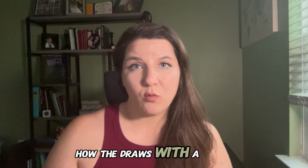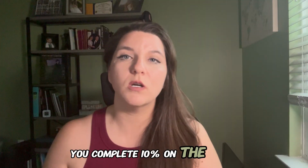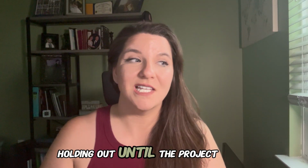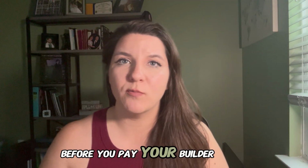How the draws with a one-time close loan work is that draws are typically given after a percentage of work is completed. You complete 10% of the work, you get a 10% draw, with the last draw holding out until the project is completely finished. Many lenders will allow an initial draw to get started, and this process won't work for every builder, but it's important to know up front before you pay your builder deposits.